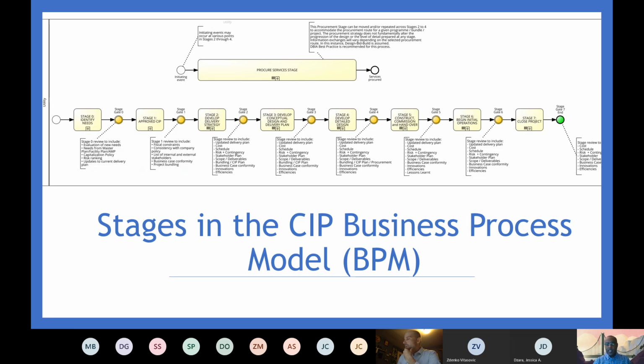The BCE, or the business case evaluation, of the CIP planning and prioritization topic, and this capital improvement program delivery topic work together, so that the 2 models are portions of one big CIP delivery model. And this is a collapsed form of that big CIP delivery model. It has 8 stages, or you could say 9 stages, because the procure services stage is somewhat flexible. It can come anytime, and it can come more than once. That's why it's placed independent of the main train here.